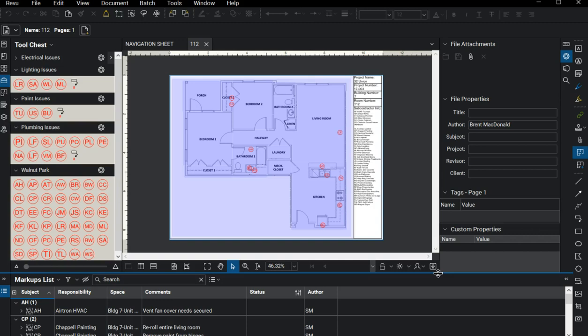Are we going to be nitpicking this thing down to every little detail, or is there going to be some latitude for some things that we might be able to let go now, and also might let the owner know, for instance, that we can come back and fix some of these things once we get to the warranty phase, once we get the building turned over? But it's more important to get that building turned over at that time.